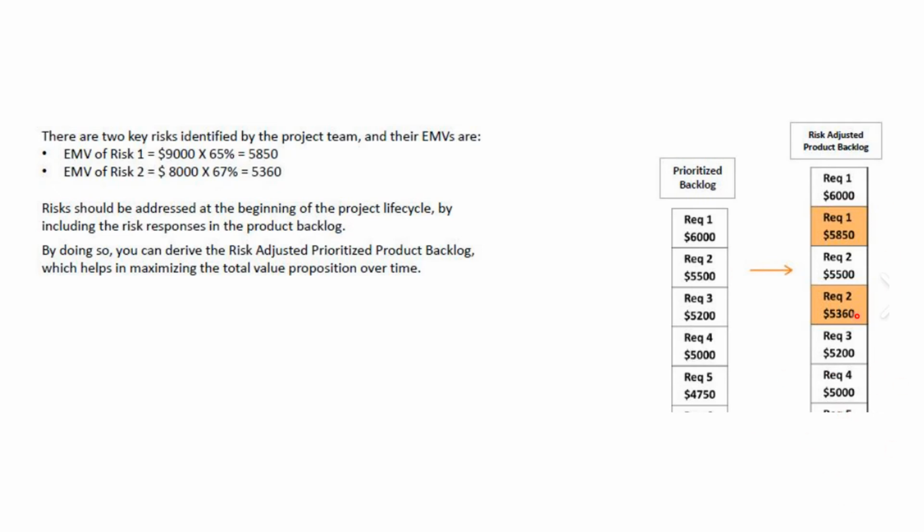According to that, you can either prioritize or deprioritize, bring it down or up. It depends on the risk associated with that user story. When you execute the user story, when you implement that particular feature, what is the risk adjusted in terms of acceptance or adaptation of it? You can see what is the revenue stream attached with that and what kind of risk, depending on the market context, product context and competitiveness context. You can figure out the risk adjusted number, and accordingly the product owner or product manager gets a chance to reprioritize. At the end of the day, the product owner in an agile method tries to maximize the value.